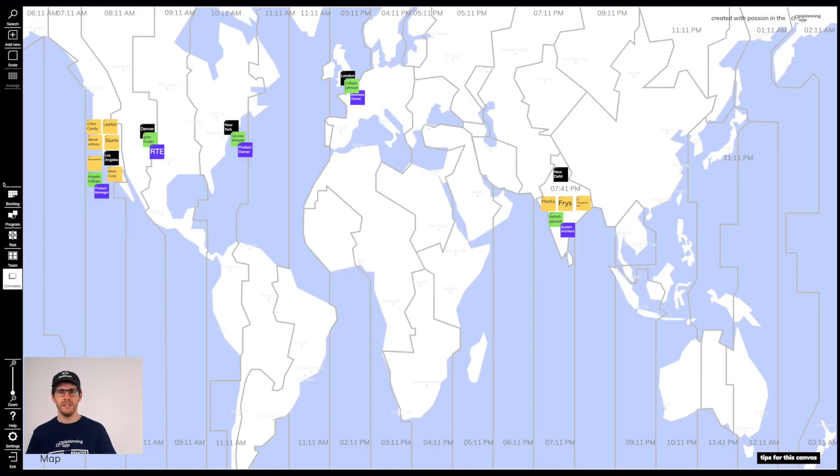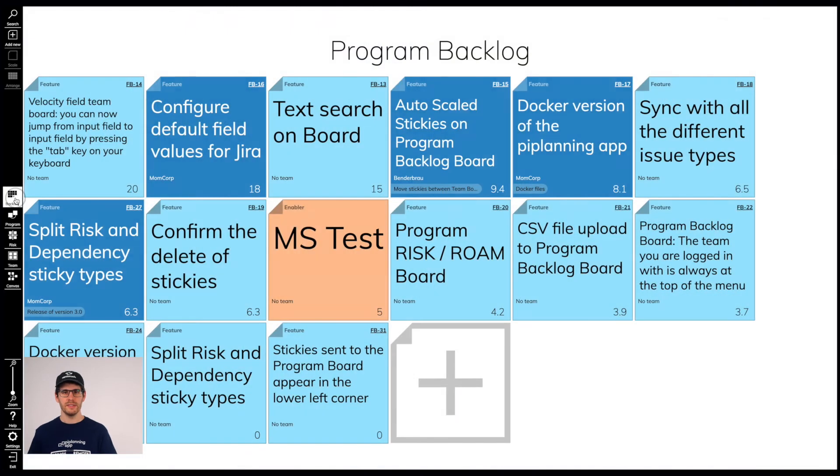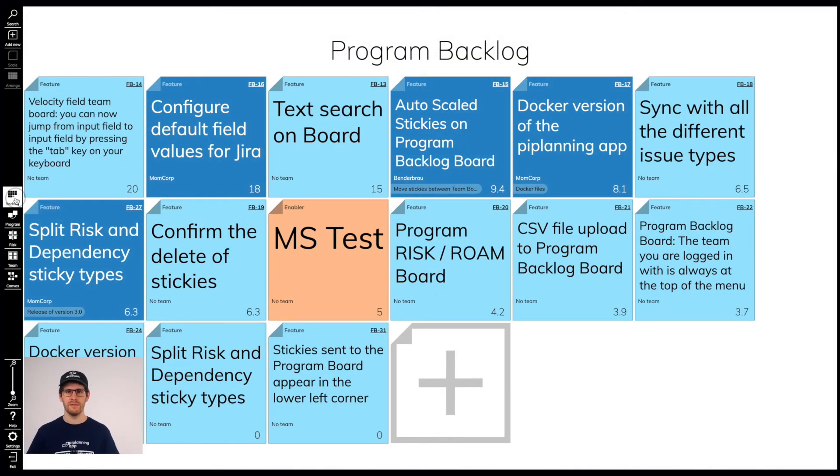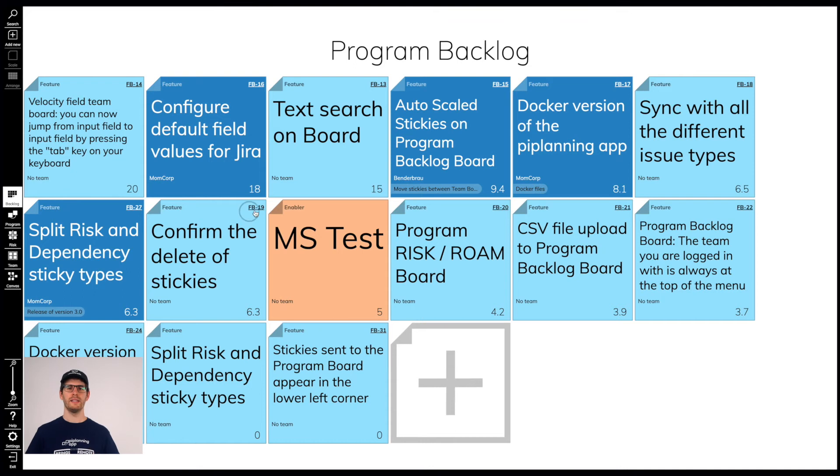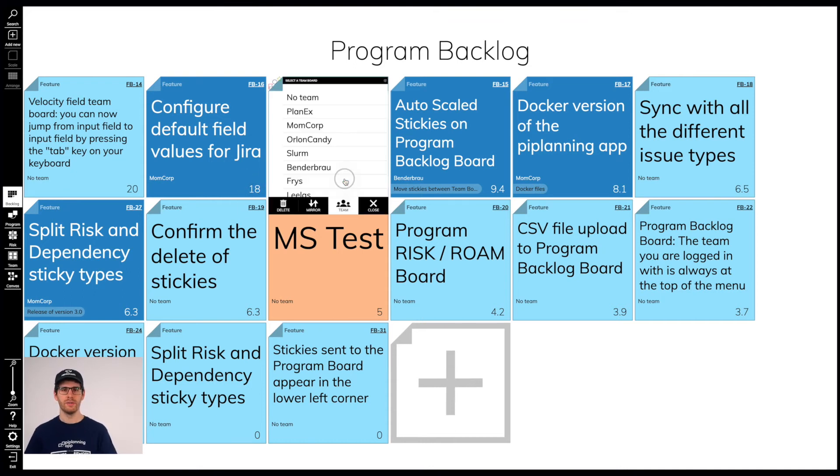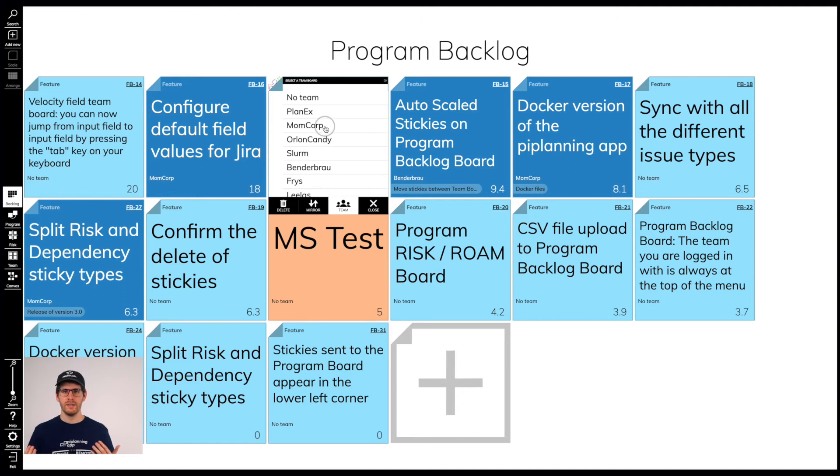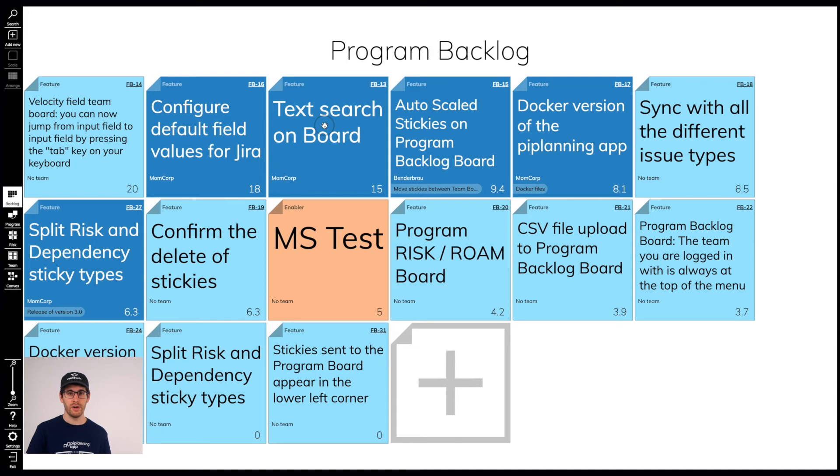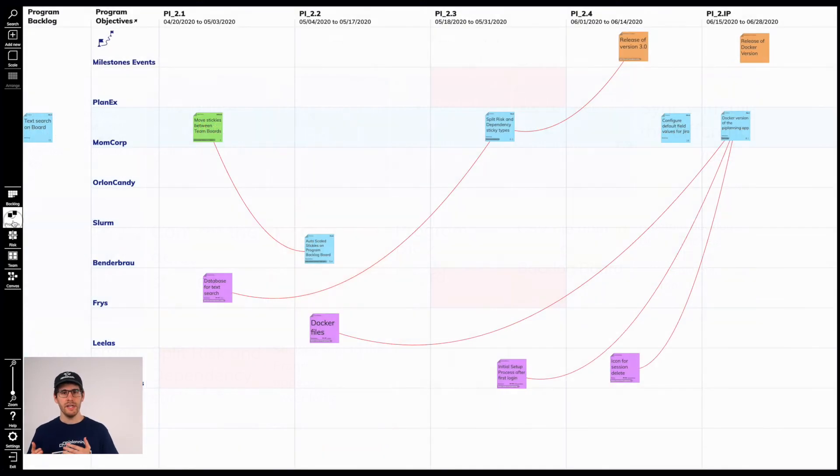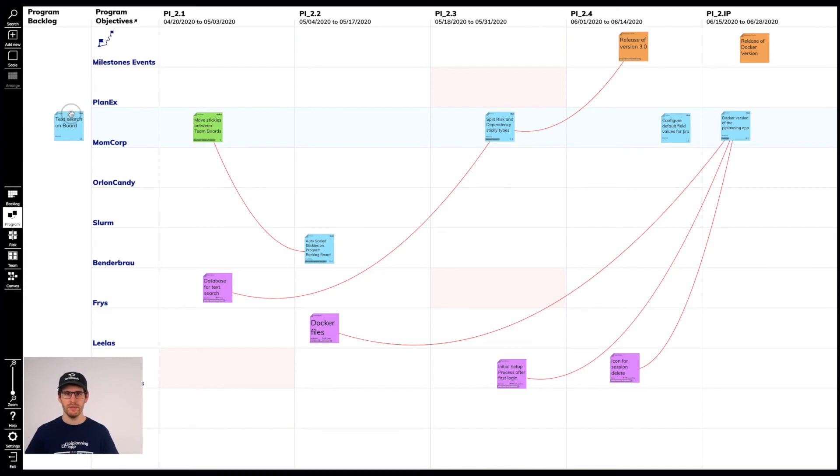Then we can dive into different processes. I think it's best if we start by breaking down features into user stories. So, we assign a feature from the Program Backlog Board, where all the items are ranked by the WSJF value to our own team. Thanks to the fact that the color changes, we have a great overview of which features are already in planning and which aren't. It appears on the Program Board next to our team name.